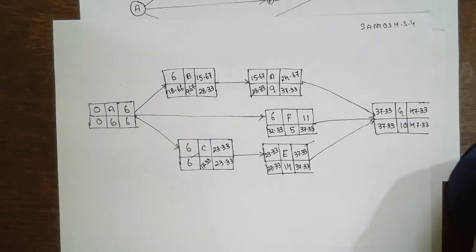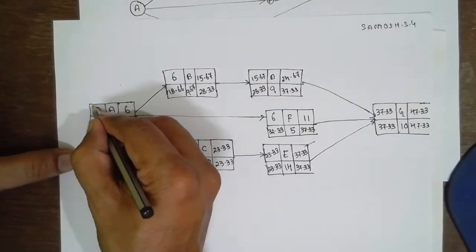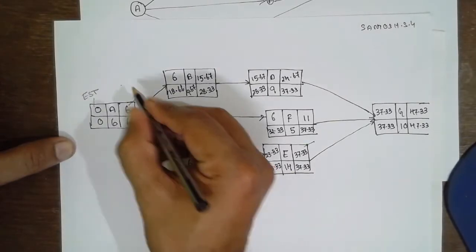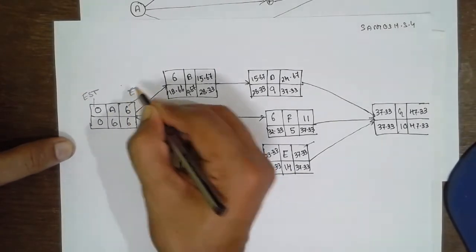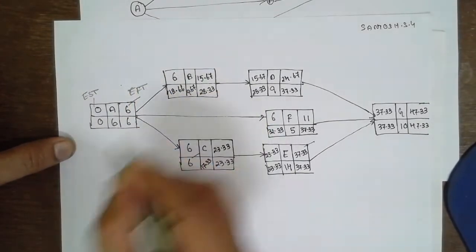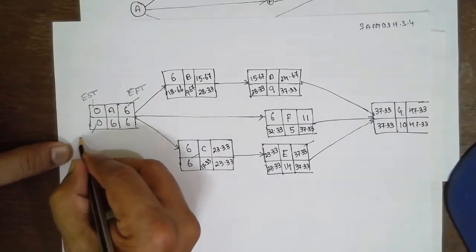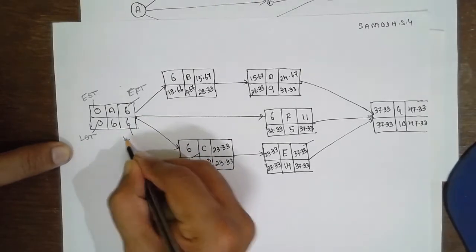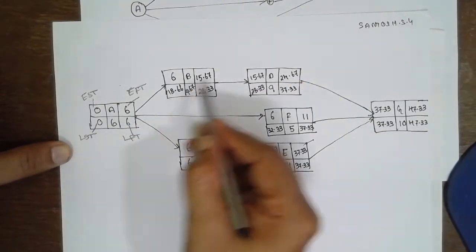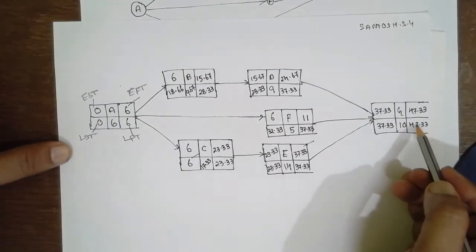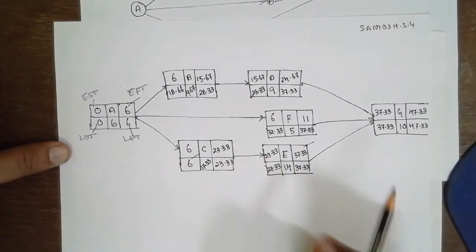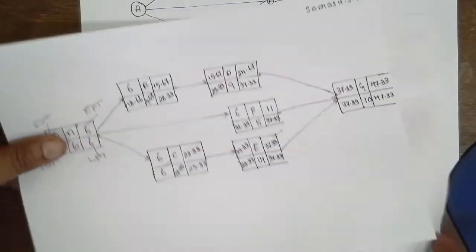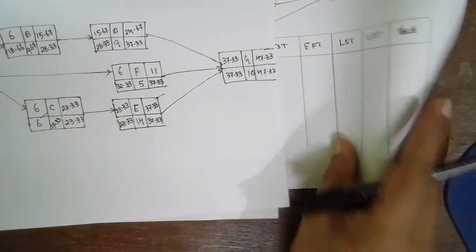The first box in each node is EST, the second is EFT. The third box is LST and the fourth is LFT. The same concept applies to all boxes. Now I am going to substitute these values into the table.